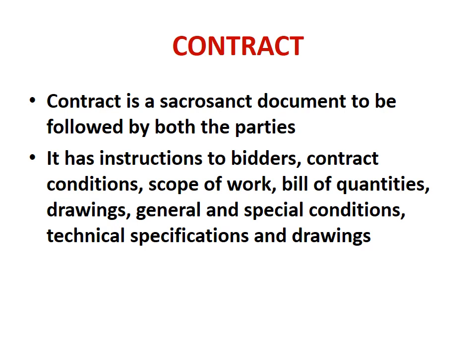Because it has the instructions to bidders, contract conditions, scope of work, BOQ, drawings, general and special conditions, and technical specifications. And it also has the preference of the documents which are to be followed in case of discrepancies.